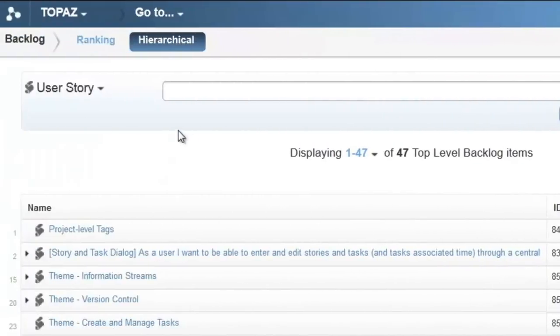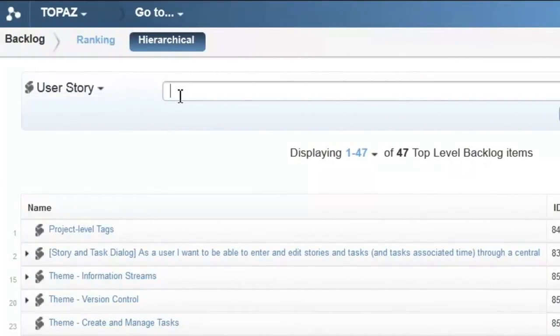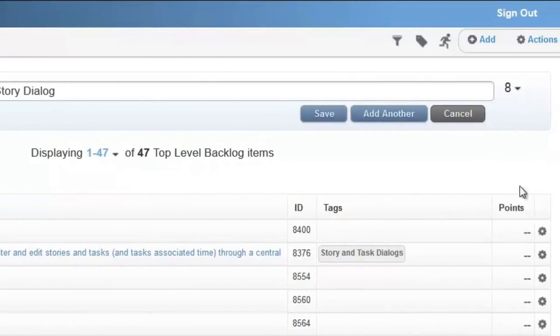On the online editor, we supply the story type, provide a name, and define the estimated story points.